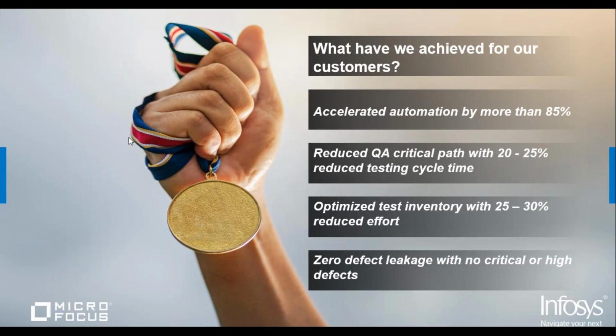We achieve the higher percentage during the initial of all the critical processes, and these also form the current base of a regression suite. The reason is not everything that you test as a part of the overall S4HANA program will fall into a regression suite. So this risk-based approach also helps us in arriving at the final scope that we should consider as a part of regression testing. So all the risk of the business process are covered.